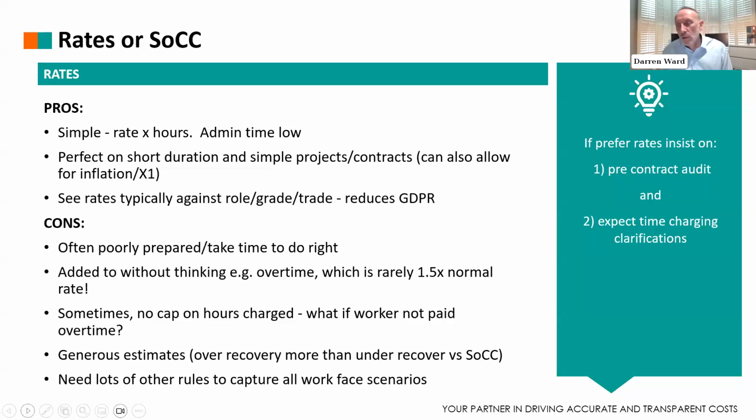What are the pros of reimbursing on rates, whether staff or labour? It's simple. Everyone loves it. It's rates times hours, incredibly easy from an admin point of view. Good for short duration, simple projects or contracts. You can allow for inflation with X1, and you don't have to do a lot. You set a rate up against a role, a grade, or trade. Very, very simple. You don't have any data protection GDPR risks necessarily, as long as you get nice wide bands on the rates. What are the cons?